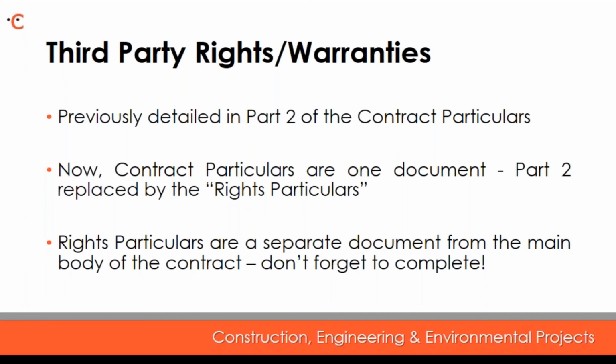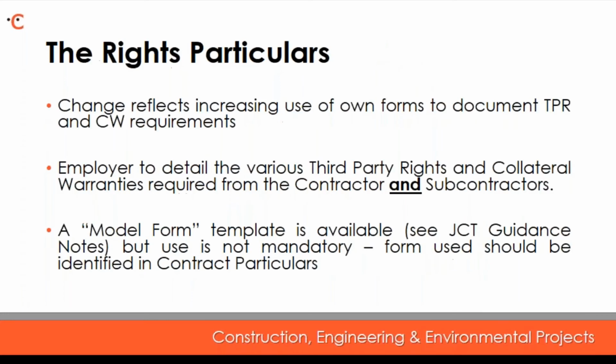It would be very easy to forget to complete a separate document, but do make sure you do so, and make sure you incorporate it properly so that it does form part of the contract. If you were to fail to do that, beneficiaries would be left without the benefit of these warranties and third-party rights, which of course wouldn't be desirable.